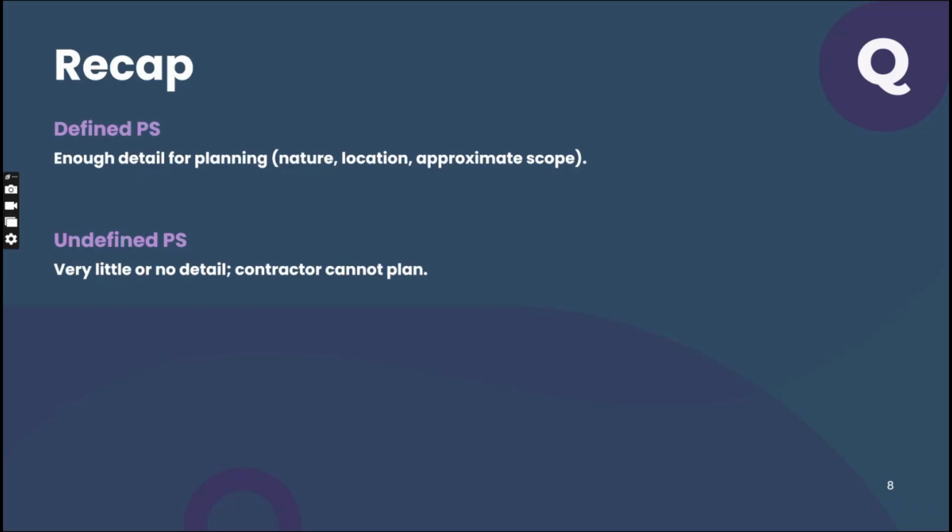But again, if you look into the demerits, there is uncertainty in pricing. Only unless you finalize the price, then only you know the final cost, and the PS item is open to market. Okay, if you're not finalizing it, it is open to market and it is subject to market inflation. That is a big risk on you.